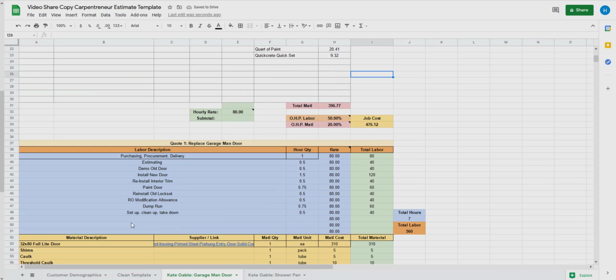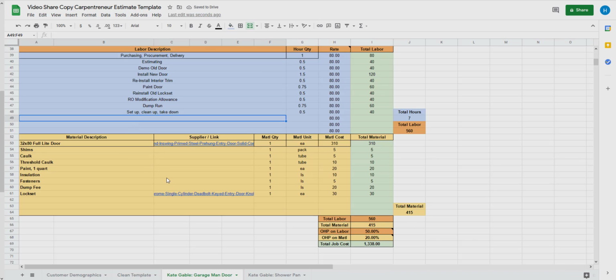Now down here, what I can do is since I came up with my number for that change order, so doing some grinding and patching, a little extra material, I charged 140 as a lump sum. So I'll take 140 in my labor column. My labor markup is 50%. So I'll want to reduce that by 50%. That would be 70.